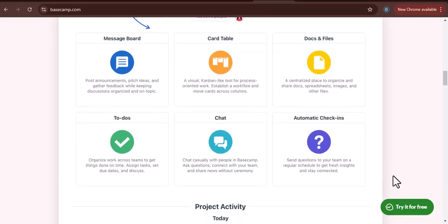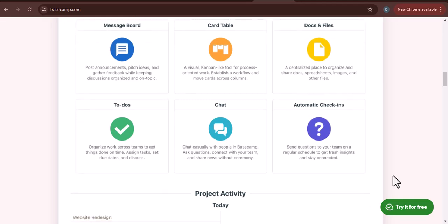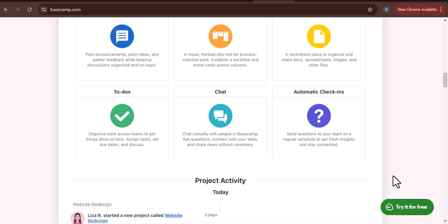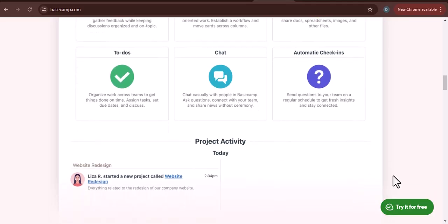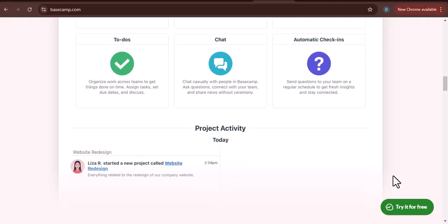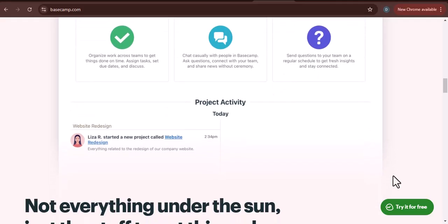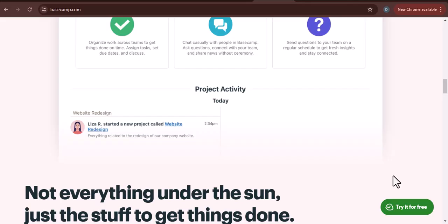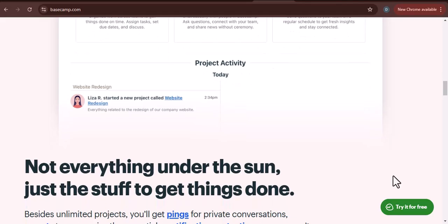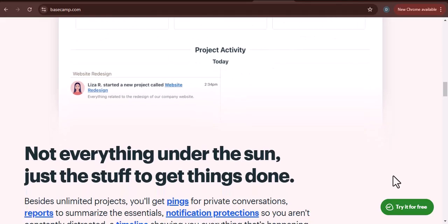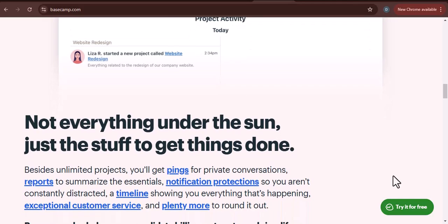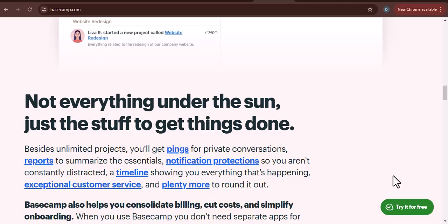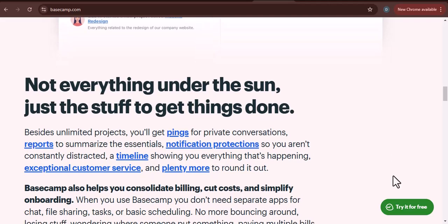Finally, let's touch upon the hybrid approach. This involves using Basecamp for its core strengths, communication, task assignment, and document sharing, while leveraging a separate, dedicated time tracking tool for all time-related data. The integration part comes in by ensuring that your team consistently logs time in the external tool for every Basecamp task they work on. This might mean having a strict workflow where a task isn't considered done until the time has been logged in the external system.